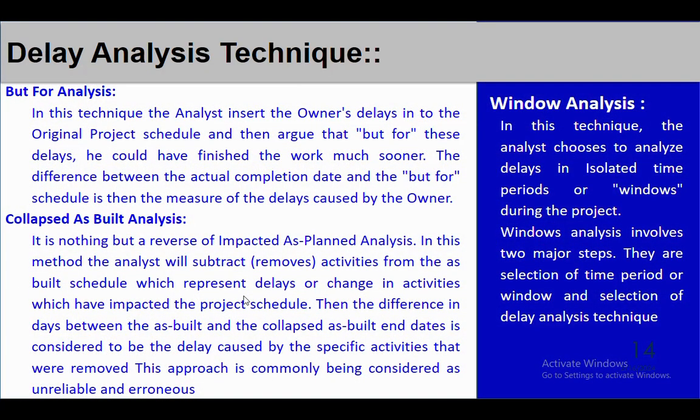But for analysis, these are techniques which we do not use often, but just for the sake of information, I am telling you about this. The first is but for analysis. In this technique, the analyst inserts the owner's delay into the original project schedule and argues that but for this delay he could have finished the work much sooner.